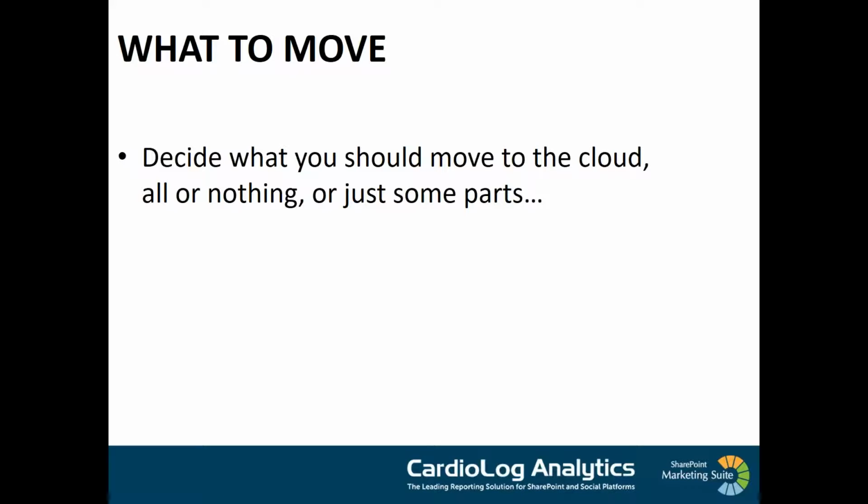Now we're starting to talk more about the key aspects of the migrating process in detail. So of course you need to decide on what you shall move. Shall you move all your SharePoint environment to the cloud? Shall you move all your IT environment to the cloud, or shall you just move some parts of it? This is actually the big question, and you need to figure out the answer really early in the process, because the longer you wait, the more time your project will take, and most likely you will have to do things twice or more than twice.